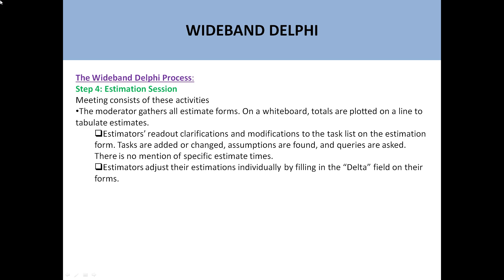Then comes the estimation session. This meeting consists of the following activities: the moderator generates all estimate forms and totals are plotted on a whiteboard to tabulate estimates. Estimators read out clarifications and modifications to the task list; tasks are added, changed, assumptions are found, and queries are asked. Estimators then adjust their estimates individually by filling in the delta field on their forms. Basically, we are now accumulating all the estimations from the individual three team members.